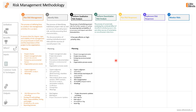For some risks — not all project risks — performing quantitative risk analysis will be conducted. It is the process of numerically analyzing the combined effect of identified individual project risks and other sources of uncertainty on overall project objectives. This is a deeper, numerical analysis where we assess the combined effect of all key priority risks on the project. The key benefit is that it quantifies project risk exposure — for example, the level of risk might be $200,000 USD or the impact on duration might be up to 60 working days. It can also provide additional quantitative risk information to support risk response planning.